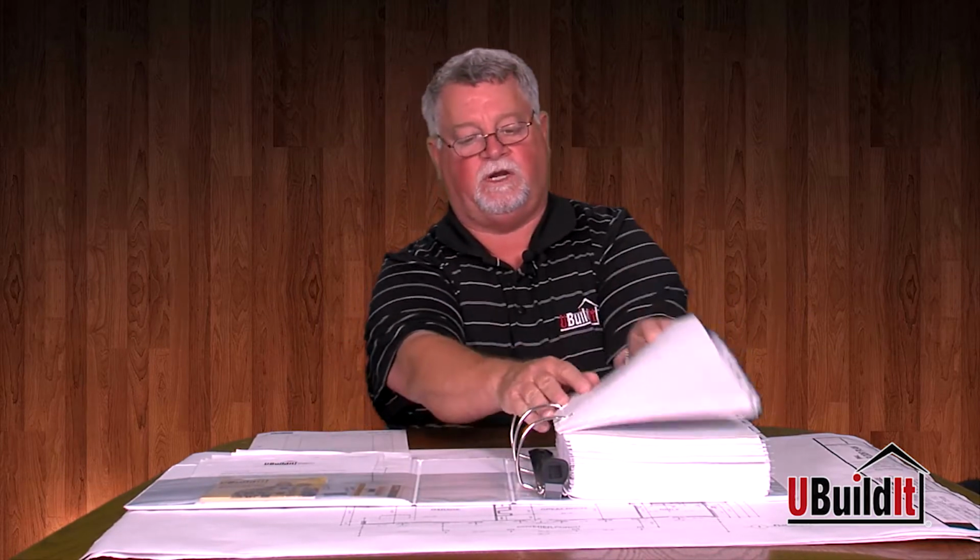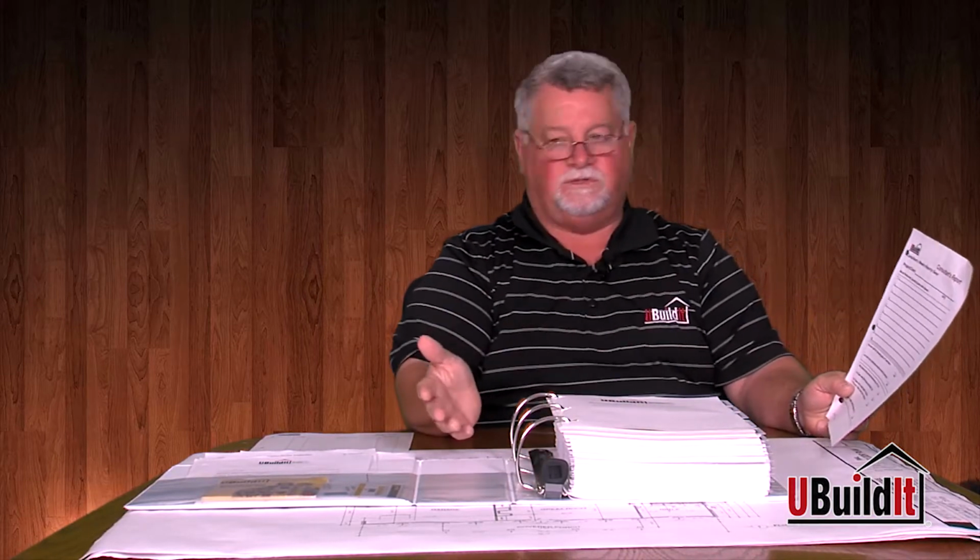So what I do after that, I tell them what's going to happen when we come out to their job sites. We're going to be taking photographs of what's been done. As consultants, we look back at what's been done. We actually have a consultant's report that we fill out in the field with the clients. Say, for instance, we go out to the job site, the forms are set, the ground plumbing's installed, then that's what we do in our reports.